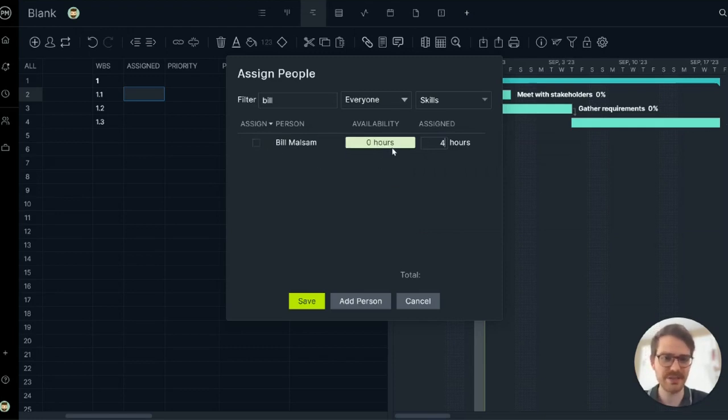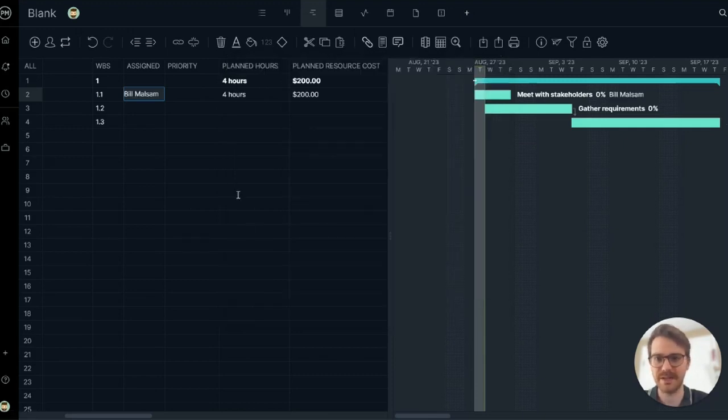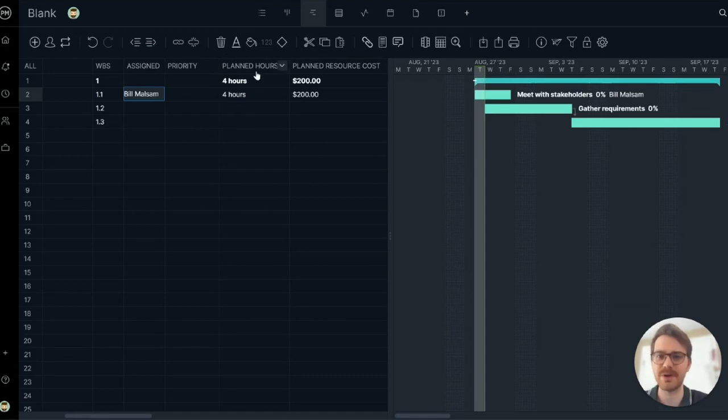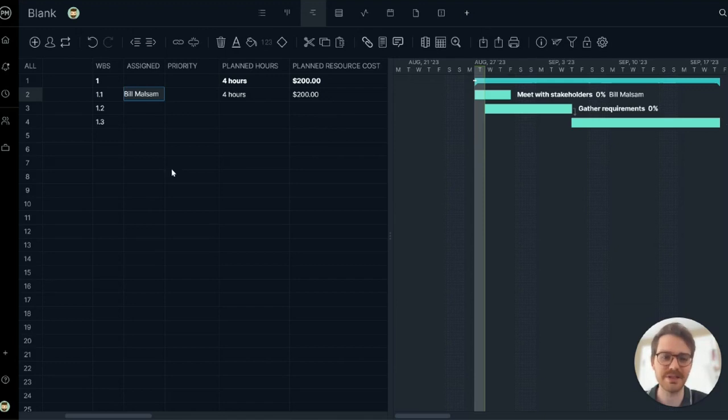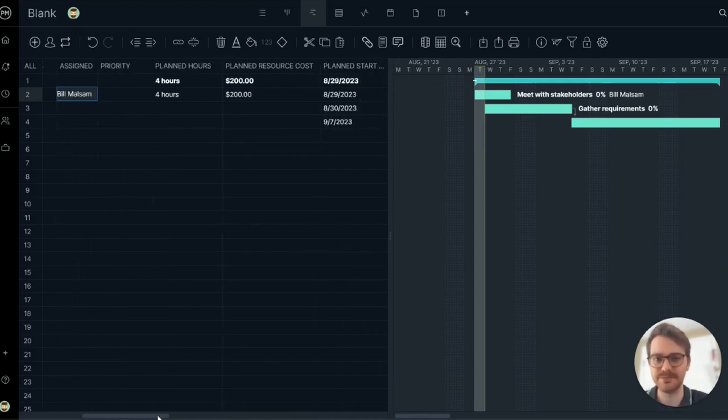This is a really handy feature because it will show your real-time availability, which is great for workload planning. All right, assign them to four hours. So now our planned hours are at four and automatically calculated my planned resource costs because Bill has a labor rate on his profile.